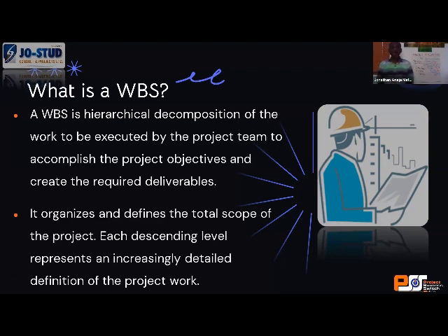What the ID does for you is, you know which one is your deliverables, at what point you have a deliverable, at what point and at what cost, right? So if you need to deliver a milestone, you break them down into WBS and allocate those IDs. Usually they are numbers, the way we do for projects in school, 1.1, 1.2, 1.3, 1.1.1, 1.1.2. It helps you to organize your work.